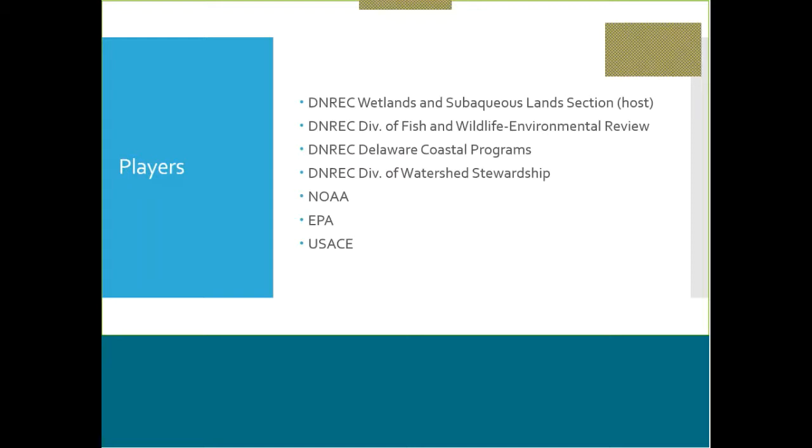Another thing that is nice to have is your anticipated schedule for project completion, because, as I was explaining during the presentation, that plays into the type of permit that you would need. If it's something that you could complete within a 1-year construction window, then it would be the SAA. But if you need a longer period of time to construct it, then it would have to go through an alternative permitting process. So those are just two of the items, just thinking off the top of my head.